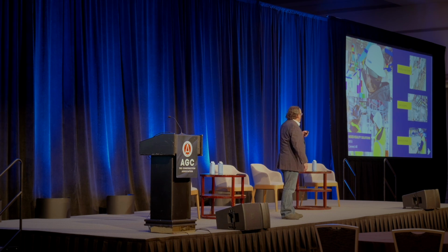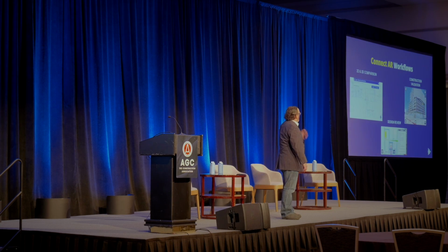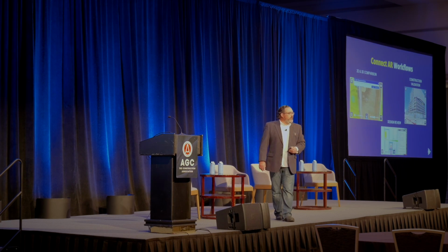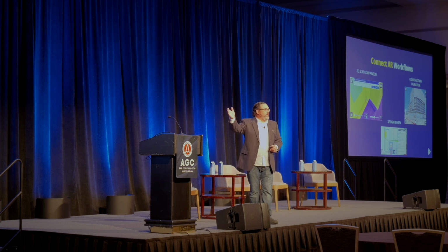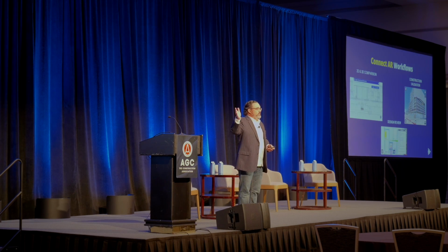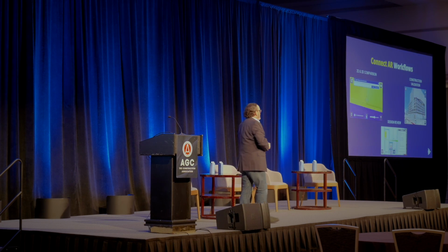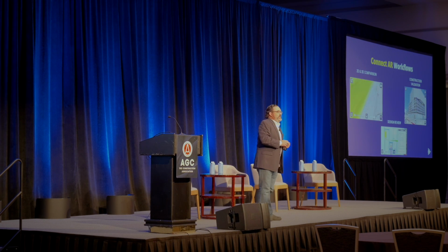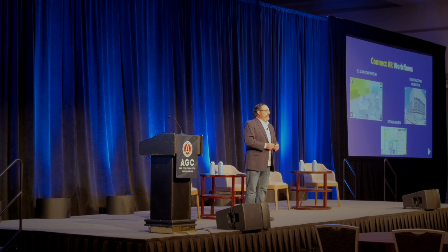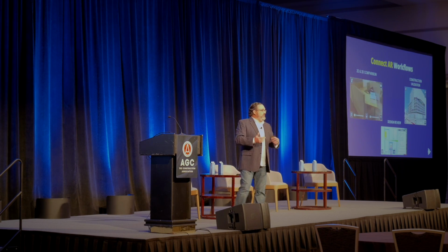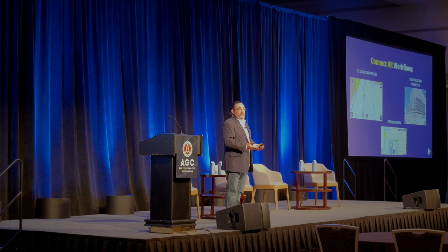We can track progress out in real time on a job. We can also do 2D to 3D comparisons. Take the PDF files, because that's the contract records. You can align them to the physical space that you're walking around, and you can say, are we installing, are we building things correctly? Is everything fitting where it should be?